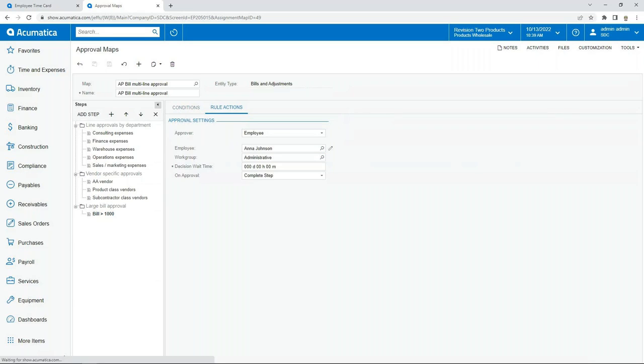So you can have multiple levels of approval as well, right? So we could go to a project manager first, and if it's an expense over $50 or $5,000 or $10,000, it could go to Kevin after the project manager approves it. Can it even be like a PO on a specific job? It knows who that PM is. Sure, it will.